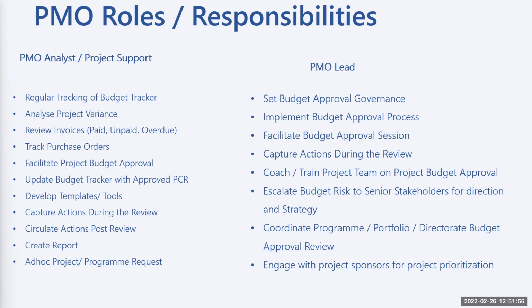And also tracking purchase orders. You remember I mentioned a purchase order is an agreement, made after the contract has been signed, saying, okay, we have this PO cover for this milestone. As a PMO person, the finance team would give you the purchase order number, and you track it to say, yes, we are still covered. Because before any invoice is paid, it needs to have a purchase order in place. It needs to be covered by a PO. So as a PMO person, you track it.